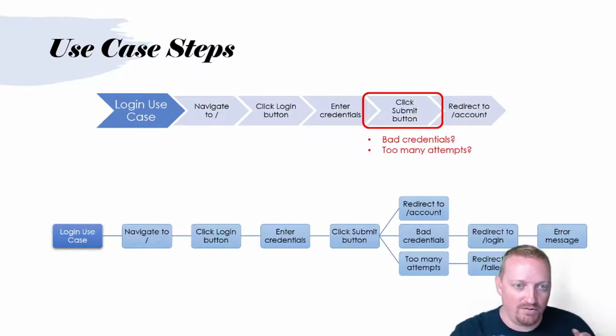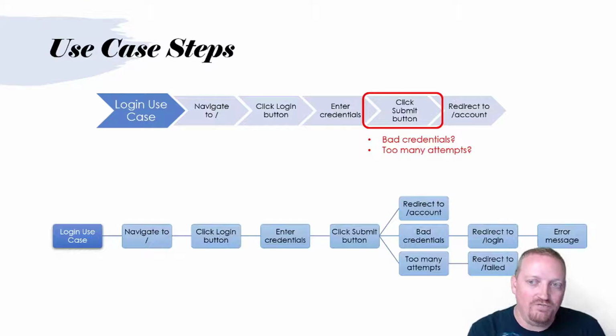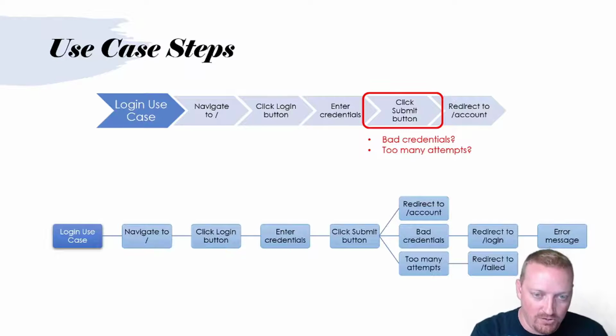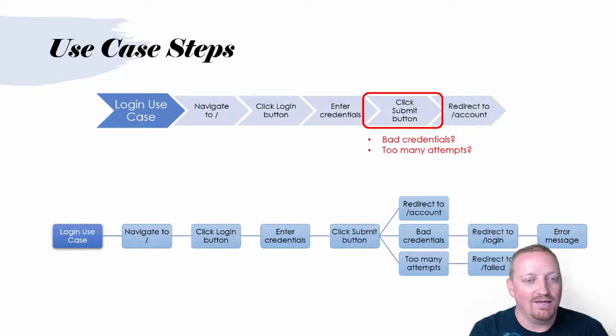Now, I want you to think about stories and look at each one of these steps. A user story is a way of articulating one or more of these steps, right? And typically, if a story is too large, it is trying to have more than one step being articulated, right? So maybe we try to create a user story that is the login user story, right? As Thomas, I want to log into the system so that I can look at my account information, right?